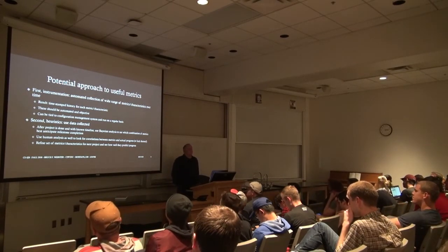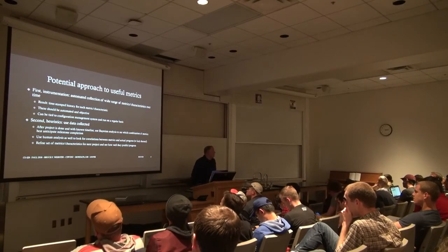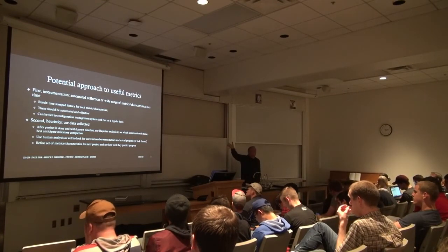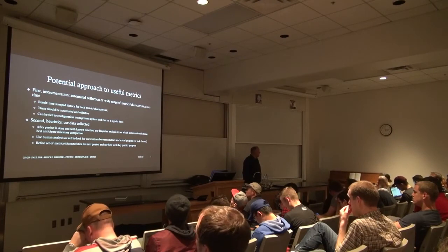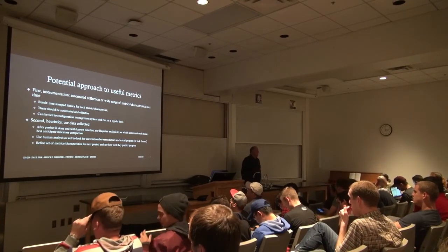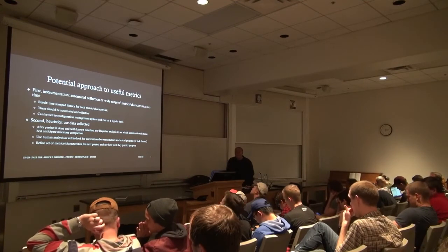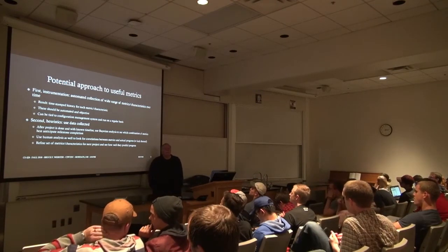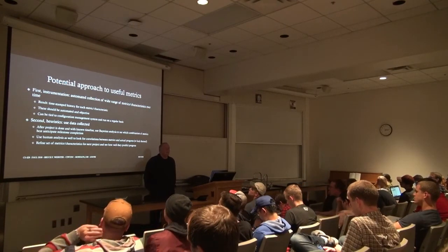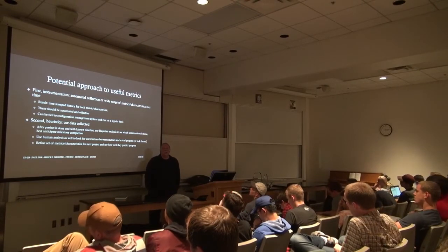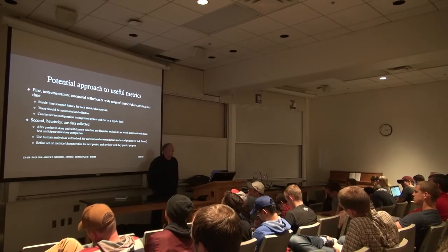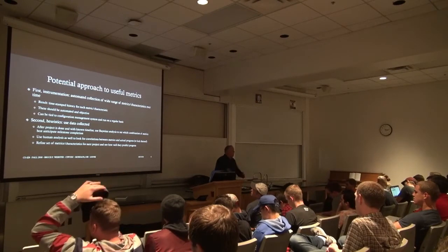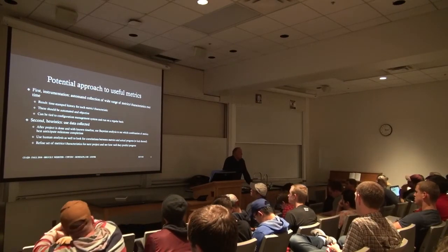Now, this is an issue I've dealt with all my career, and I don't have a lot of easy answers for metrics. This is an approach, and if you think about it, this is basically a machine learning / Bayesian approach to metrics, which is: instrument your project, collect data, metadata on your project while it's in place, and then do analysis after the end of the project to see what characteristic or combination of characteristics best predicts the completion date of the project. There may not be any. And no one's funded me to actually try this out in real life and see how to make it work.